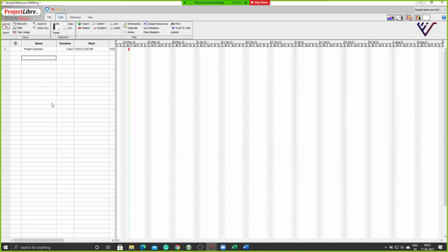When you're assigning costs to your resources, you need to know which can be categorized as task, subtask, or work package. Okay, how the client gets billed. The client will usually get billed for work packages and not for a subtask or a detailed task.